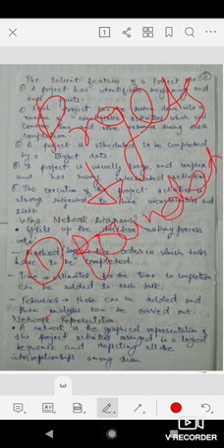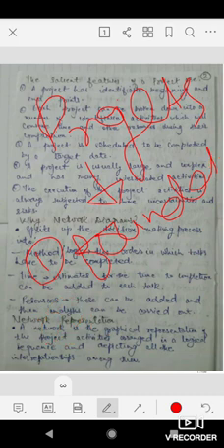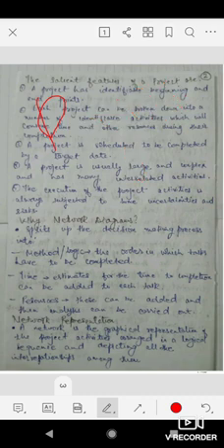Then the second will be making of columns. Then third will be beams. Then we are going to make walls, ceilings, and different activities. So the project is construction of a building, and it has been broken into many different activities. This is the second feature of a project, that any project can be broken into a number of different activities which are identifiable, which will consume certain time, and we will know the approximate time duration of that activity.